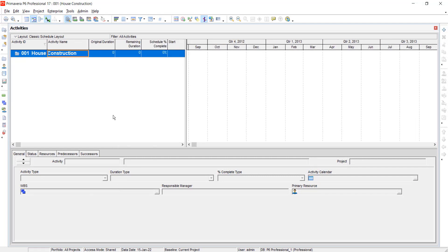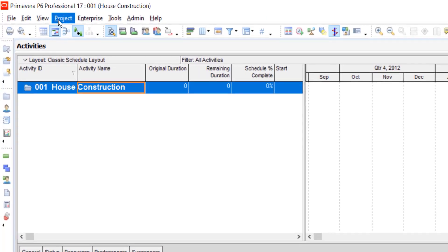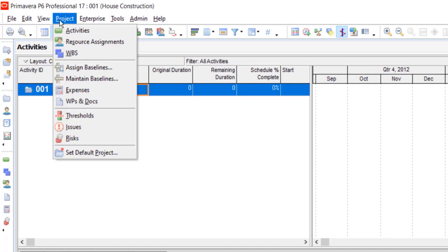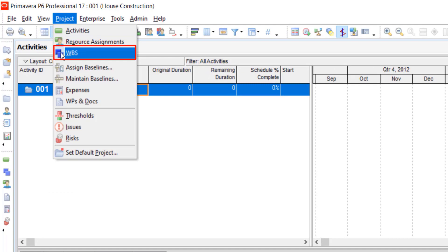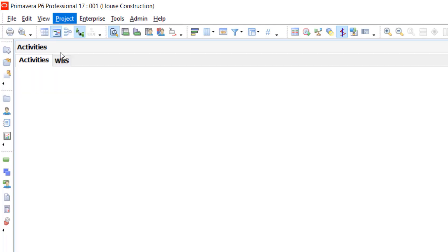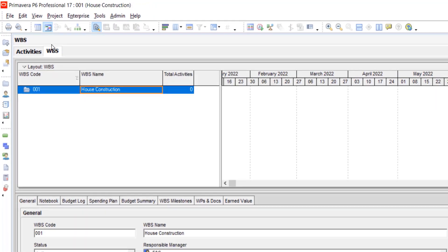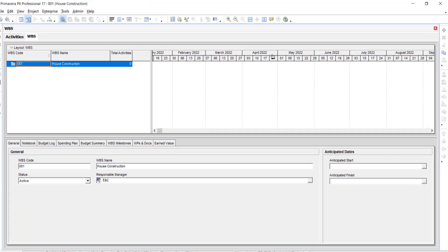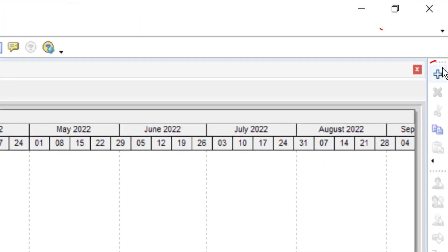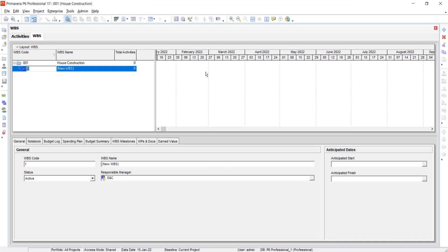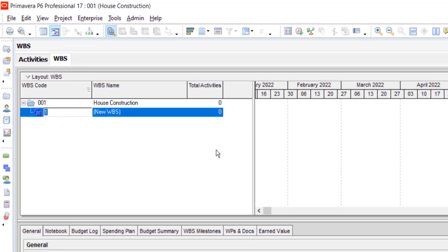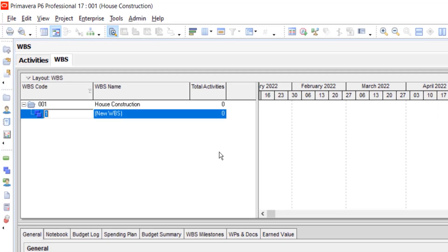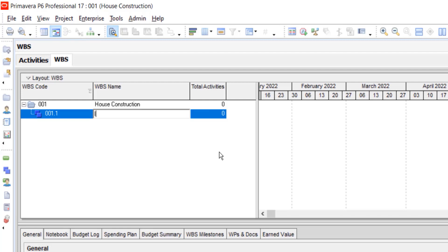Create WBS. Go to project in the menu bar. Select WBS. Here you are. Select this one, click on add. Do not change the WBS code. Select the WBS name. As we have already discussed, we will name it as initiation.